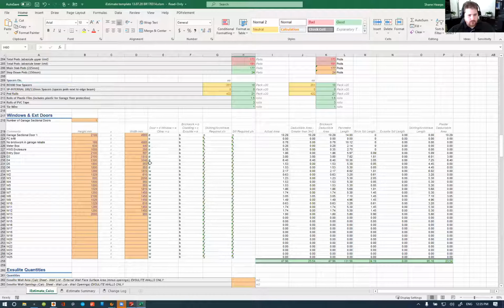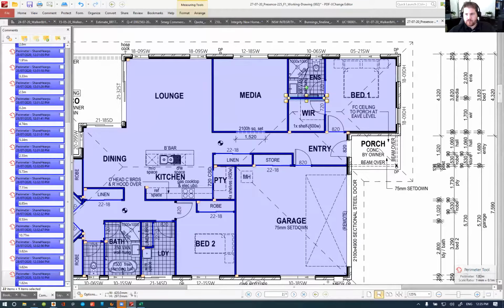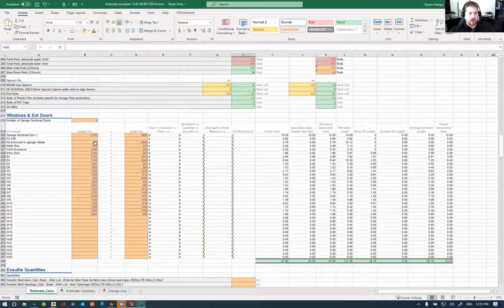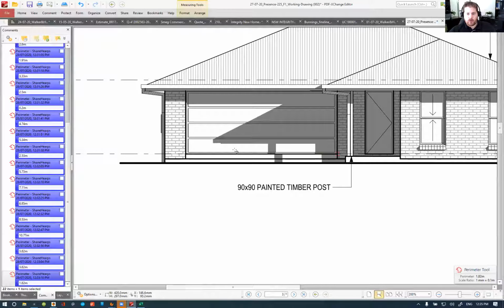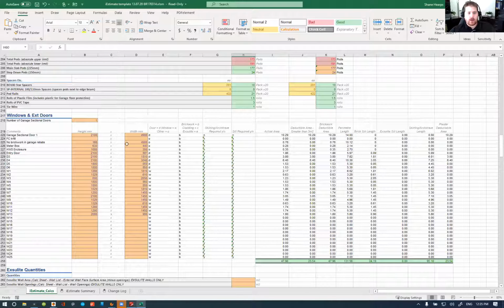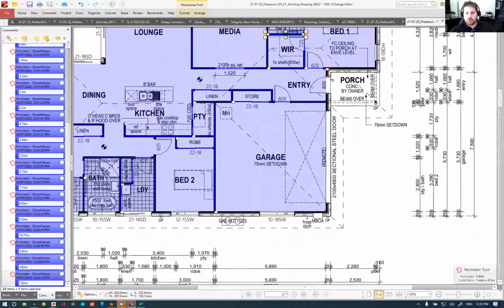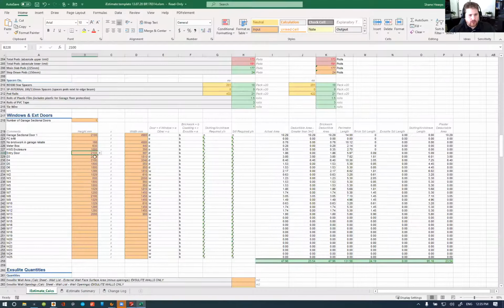Pardon me. Now the windows and doors, where they've all been drawn as nominal standard sizes, and we're just going to go through and triple check that all these are classified correctly and that the correct deductions are taking place. So 21 by 49 for the garage door is correct. 160 by 49 is the 2 bricks placed in the rebate here that are being occupied by the driveway and therefore do not exist, so they've got to come out. 1000 by 350 is your hot water enclosure. Entry door 21 by 887. 887 is the door jamb size of an 820 door.